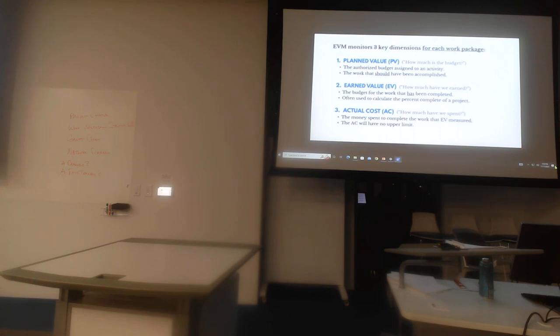And the total planned, like if you add all the planned value up for each activity on the project, you're going to have your budgeted completion, your BAC. And so total planned value is really our budgeted completion, what we budgeted to spend by the end of the project.